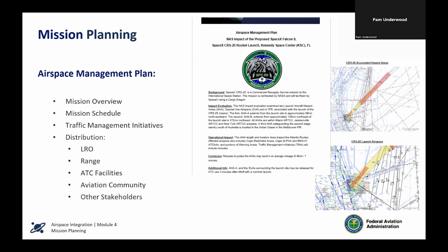How do you deal with launch date slippage and the impact on the traffic analysis? For Mark, when we receive the operator intent to launch, they'll include backup dates, and we will do an analysis not only of the primary launch date, but any backup dates that are submitted at the same time. So that's part of the intent to launch. Our NOTAMs will also include those backup dates.